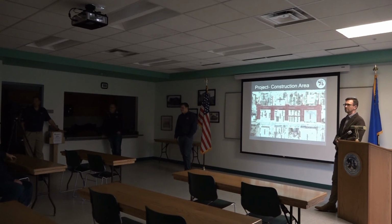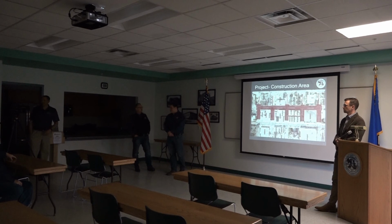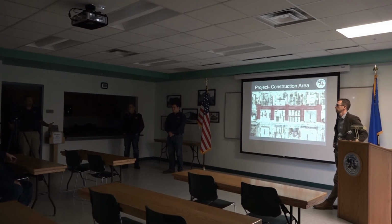May sound like a petty question, but where are your guys gonna be parking their vehicles? That's a challenge, because right now there are contractors taking up more than half of our parking for that area in that lot. Our guys' personal vehicles, we'll park them away and shuttle in. But a pipe crew's got 2 pickups, the foreman's got his pickup, the landscaper's got 2 pickups, so there's gonna be a lot of labeled vehicles still in the area impacting. And then the logical thing would be, hey, put them in the closure. Well, the whole idea of the closure is trying to get room to work, so we're gonna have to work together.